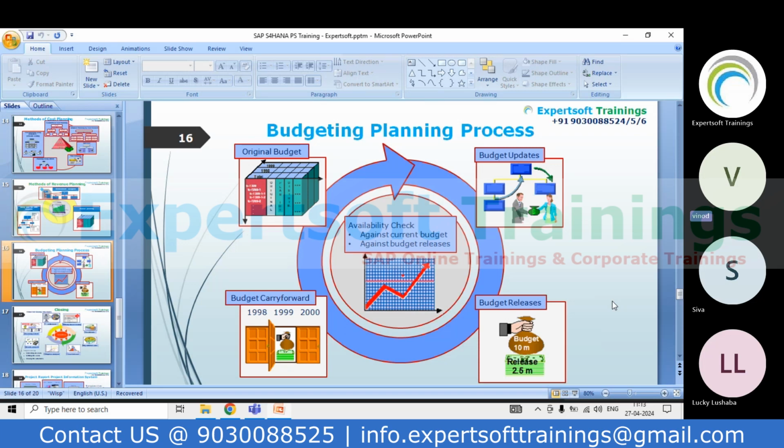If 95% is exhausted, the system will give you a warning message with mail. If 100% is exhausted, the system will hard stop you. Say you don't have any budget, you cannot proceed further to create any purchase requisition, purchase order, goods receipt, or any JV postings or timesheet bookings. It is up to the business how they guide you, and based on that you have to do your configurations.